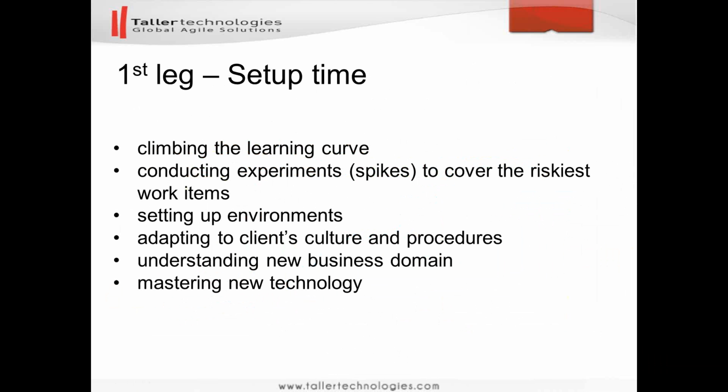The first leg of the Z-curve is the time when the developers climb the learning curve and set up their minds for the new project. But this leg of the Z-curve could also be used for conducting experiments or spikes to cover the riskiest work items, or setting up environments, adapting to client's culture, or understanding new business domain, mastering new technology, accepting client's procedure, etc., etc. So it's a setup time.